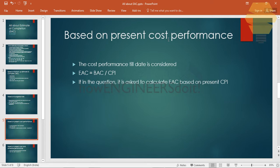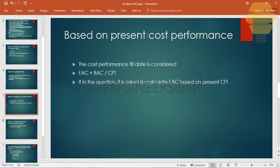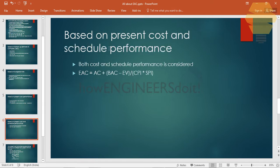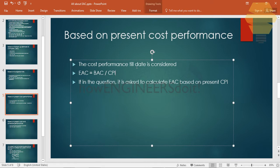The third scenario is based on present cost performance. This considers the cost performance the project has been showing up until the point you're calculating the EAC. The formula for this is simply BAC divided by CPI. You can use this formula when the question states to calculate EAC based on present cost performance.